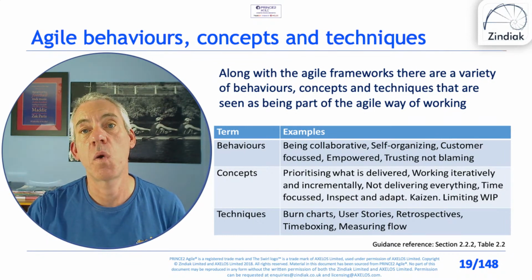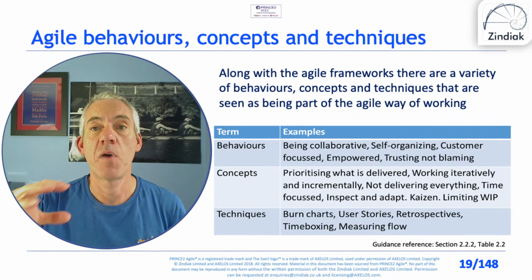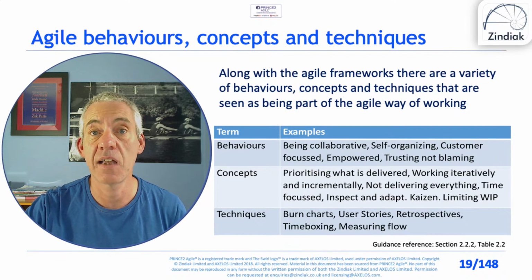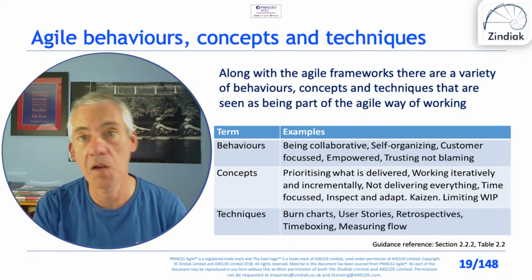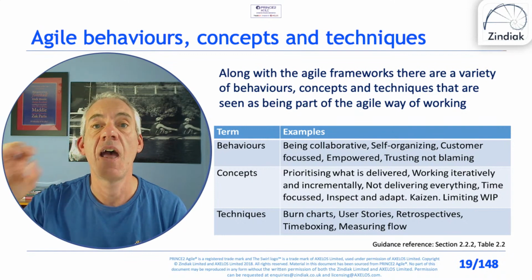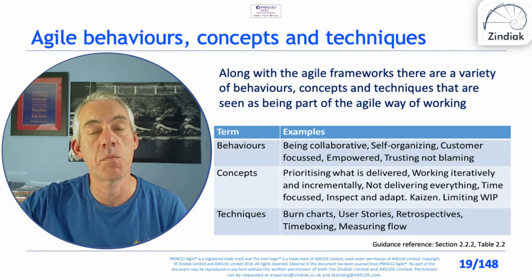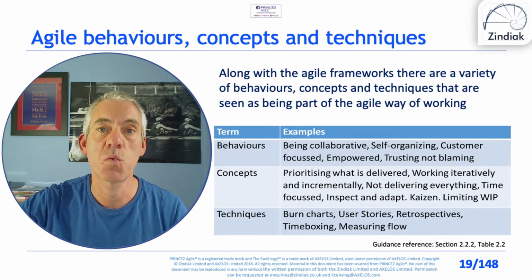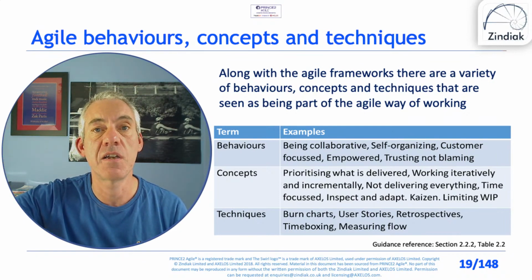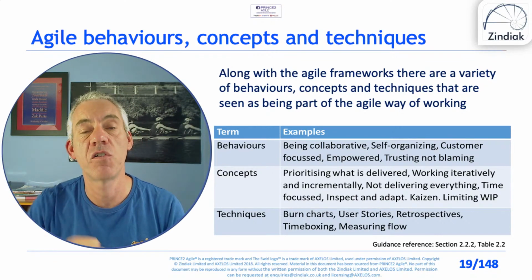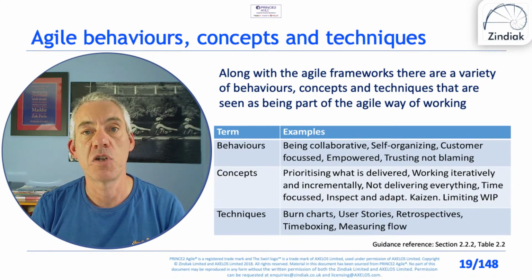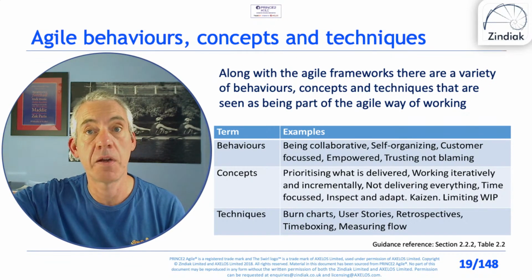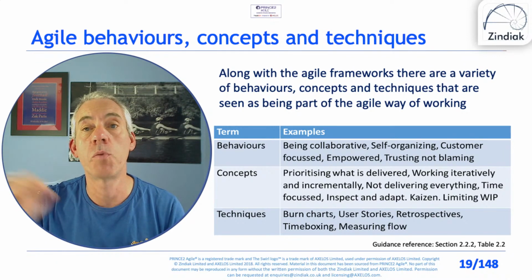So there'll definitely be a question in the exam about who has authority to make decisions at the detail level, which is the low level where the developers are working, and who can change the baseline, which is the more macro level, aligned to the business case, and that's where we'll need to go to a higher level of authority on the project. So whether that's the project manager or the project board or above them and to corporate, the customer or program management.